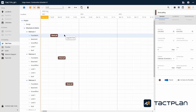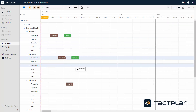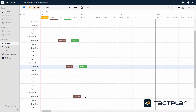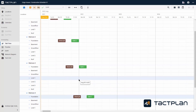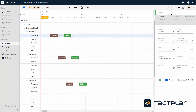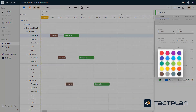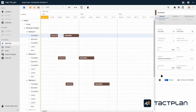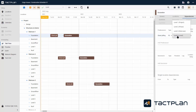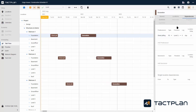The next task is Excavation, which has a dependency to the recent task. To add it, click on Add Task, Add to Selected, and add dependencies to recent tasks. Write the name Excavation, set the duration — let's say eight days — and then choose the color brown so we know that it's for foundation. Now you can see there is a dependency between the two tasks. You choose that the dependency must be on location level staircase. Excavation must only start when Sheet Piling is completed on all locations. Remember to save.